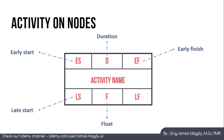Float (TF) is the total duration an activity can be delayed without affecting the overall schedule. Finally, LF (Late Finish) is the latest date the activity can finish without affecting the schedule; it equals Late Start plus Duration and will equal Early Finish for critical activities when float is zero. This may seem confusing at first, but it becomes simple once we solve an example.